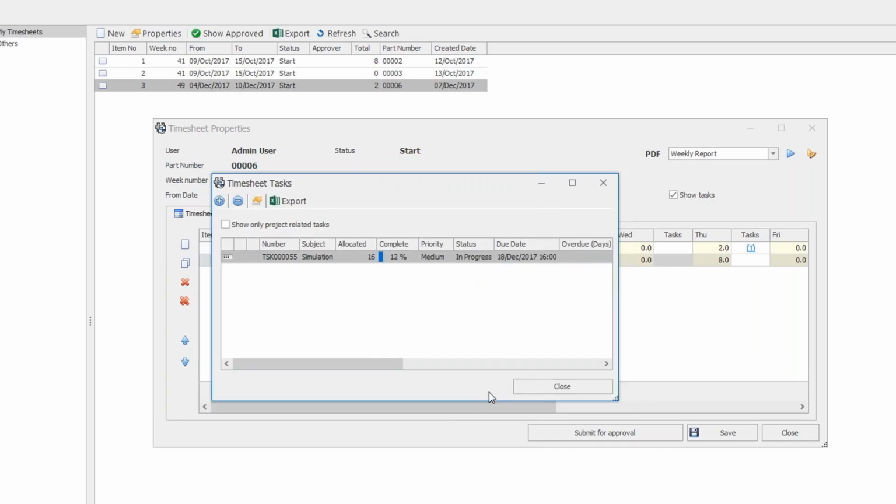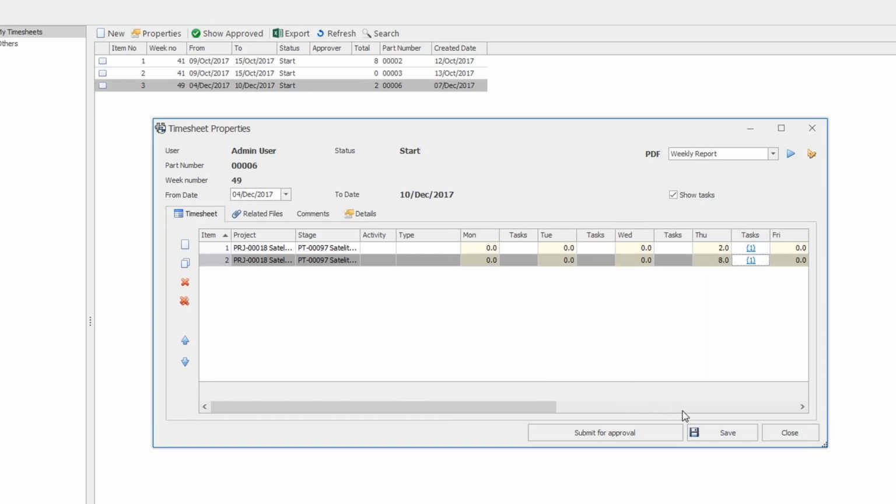So now that he's doing that, all of this is compiled into my project. So if he's put in 8 hours out of 16, well, in my project's task, it's going to show that it's halfway done, right? But he could say, oh, well, it's actually completed because it was faster than I thought. So again, that will update my project.